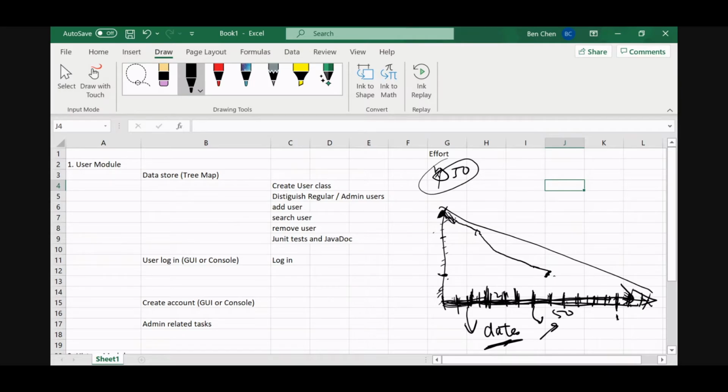Say you have 50 hours of work to do. That's a bunch of effort you need. Then if you finish 25 hours, you finished half of the task, the effort. So don't use the plain percentage, in other words. It's very ambiguous what that means. But hours is more precise.